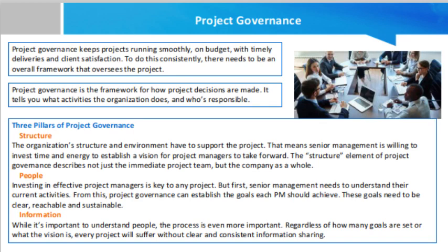Now, what is the role of project governance? Friend, there are several roles within project governance, which include the project owner. This person is front facing as they represent the business. Therefore, they are usually not the project manager since they tend to hold the project manager to account. Key stakeholders. A project board made up of key stakeholders. They are either the people who fund the project, customers of the final product, or suppliers. Limit the number of key stakeholders to a maximum of 6 to keep the process efficient.